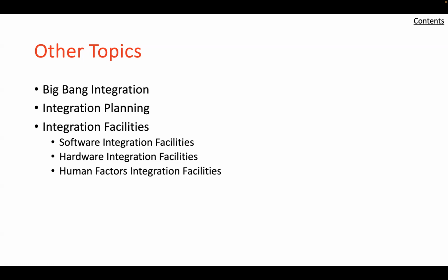Correctness of integration is also an important concept in order to ensure the integration is completed properly. As this may seem intuitive, a review of the following items is helpful to verify within the integration phase the correct integration plan is followed. The integration timeline allows for sufficient time to perform the work. All components and configuration items are accounted for. All interfaces are identified and verified, and all tools and procedures are available, and all work is documented.